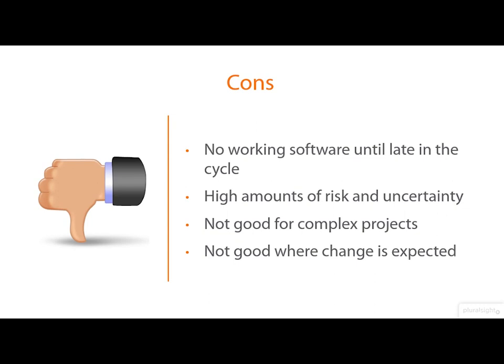If you're working on a project where change is expected, then waterfall is not the right model for you. I've worked on projects for a financial services company previously, where changes in the law were causing compliance regulations to change. Unfortunately, these rules were very open to interpretation, which meant the legal team were involved at a very early stage. This meant that the interpretation changed a few times during the course of the project. If this had been a waterfall project, we would have been in big trouble, as regulatory projects normally come with a very hard and fixed set of deadlines. This was a perfect fit for an Agile project.